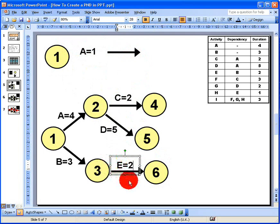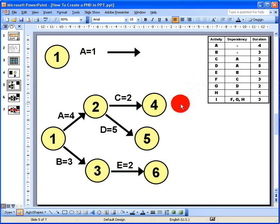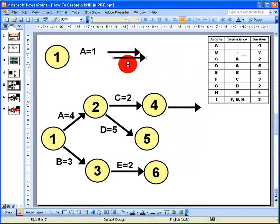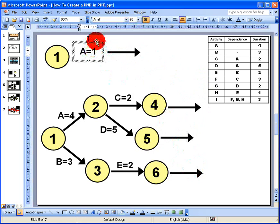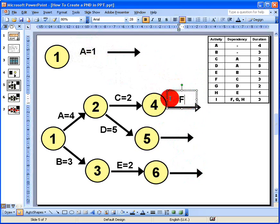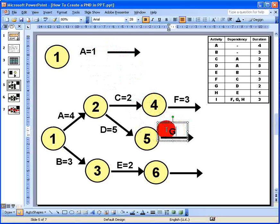It gets a little more complicated from here, and this is where many people make mistakes. Activity F begins when C is complete, activity G begins when D is complete, and activity H begins when E is complete. I copy and paste three arrows for these activities and add their labels: activity F is 3 days, activity G is 2 days, and activity H is 1 day.